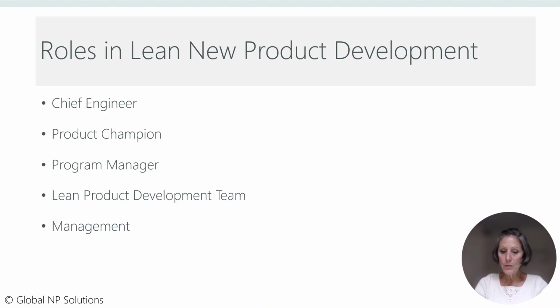Lean new product development team. Like all effective new product development project teams, the Lean new product development team is cross-functional. As shown in the prior figure 18-1, the core team is limited to 6 to 10 people who are identified on the working team grid, which we discussed in WAGILE figure 13-2. Smith and Reinersten suggest the following disciplines serve on a Lean new product development team: product designers, hardware and software engineers, manufacturing engineers, procurement, and marketing.